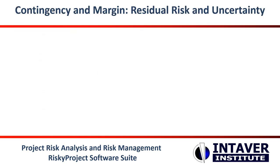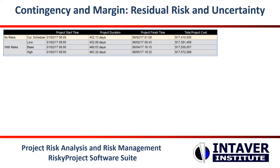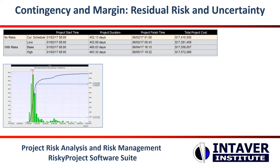Finally, even after mitigation and optimization, what remains is unmanaged or residual risk. To account for this, we run a final simulation to generate a risk-adjusted cost contingency and schedule margin based on the project risk tolerance. These are the buffers that will protect your project delivery dates and budget in case risks do materialize during project execution.